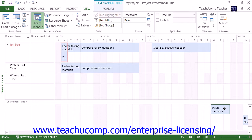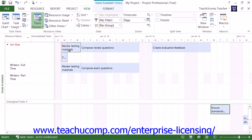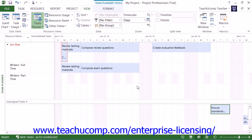Resource tasks that have been over allocated, where two tasks are assigned to the same work resource, will be shown with a red border. Note that non-working time for resources will be shown with gray bars within the schedule.